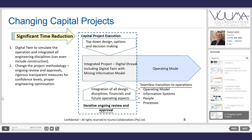We need to change the way we do capital projects. This linear process of a concept study, then pre-feasibility, then a feasibility study with linear stage gates needs to be re-examined. A digital twin will let us integrate all the engineering disciplines, allow for an iterative ongoing review process, and let you make a decision about the project at any point in time. Importantly, that digital twin can become the operating model of the final mine, seamlessly moving into operational mode rather than leaving the 3D model in the hands of the EPCM.